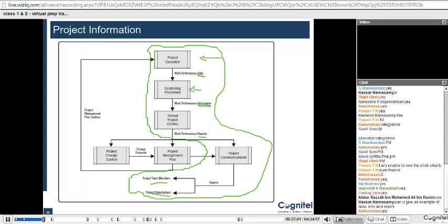He just wants to know what is the cost that you have used so far, how much is remaining, and whether you are ahead or behind. So you would segregate all other information, keep only that particular information, present it in a format as per the stakeholder, and send the report to that stakeholder. That's how the info then gets converted into a report.